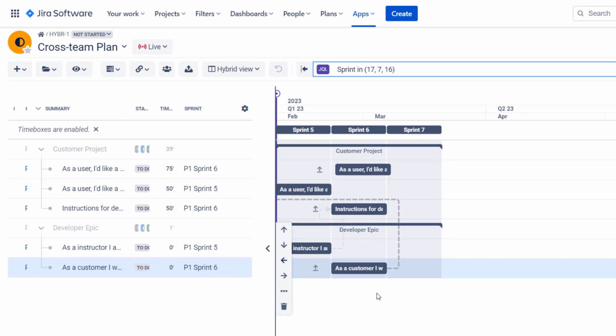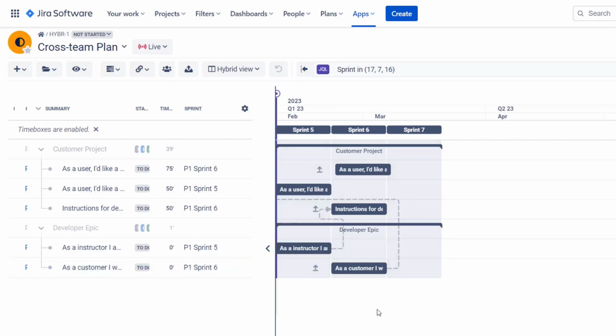Let's say that our legal department is not working agile. They plan stuff more waterfall. We could have issues here that are planned normally on the timeline, connect them with hard or soft dependencies, depending on what suits us better at the moment, with the tasks planned in agile.